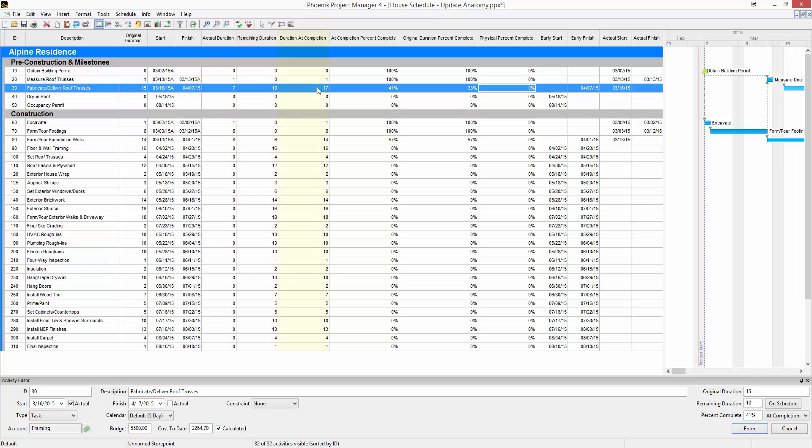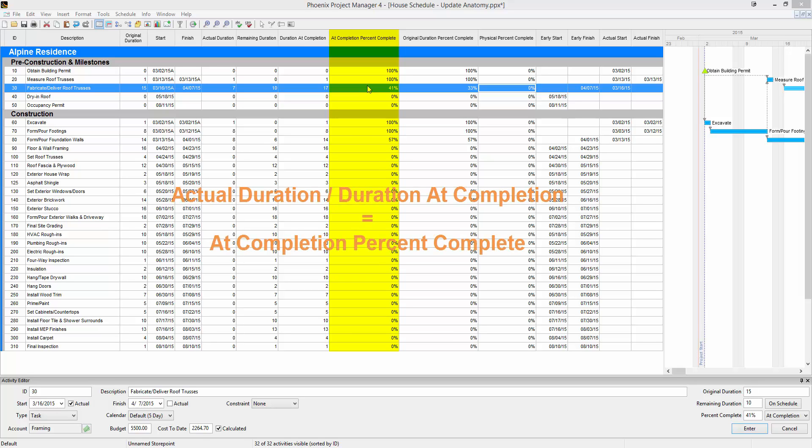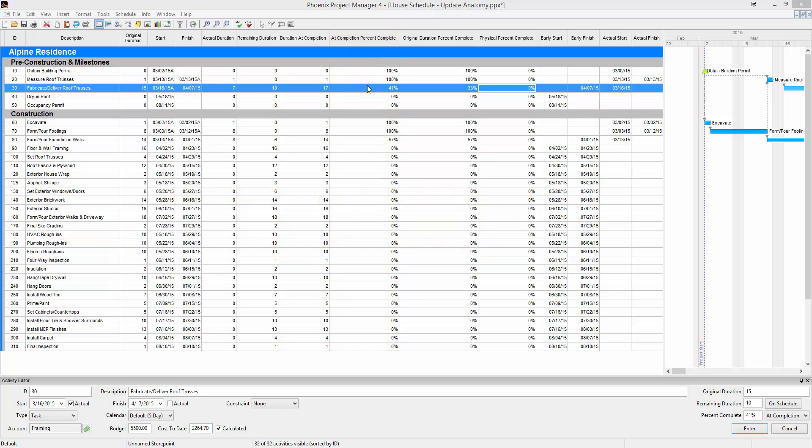There's duration at completion. This is the sum of the actual duration and the remaining duration. There's at completion percent complete, which is the percent complete that is used by default and I recommend using. At completion percent complete is actual duration divided by duration at completion.